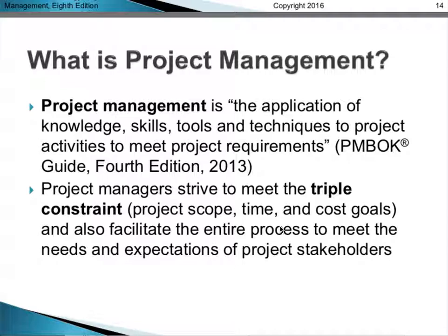Everything is measured into fragments of FTE, or full-time equivalent resources. So if you have people that are already working 8 hours a day, one person at 8 hours a day equals 1 FTE. And if you can't hire anybody new to start on a project, you have to pull away from existing FTE resources in order to get the project complete. So you have to properly allocate for that during project time. Very important.